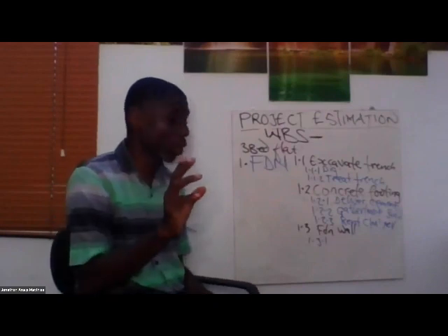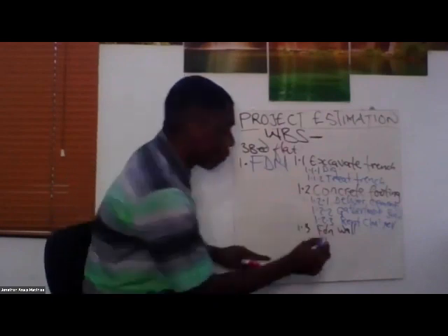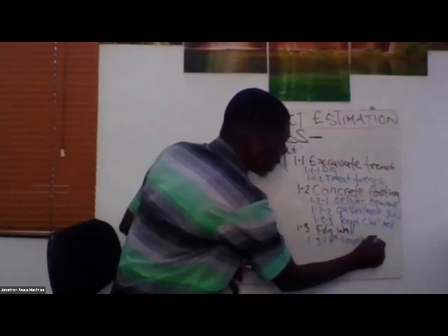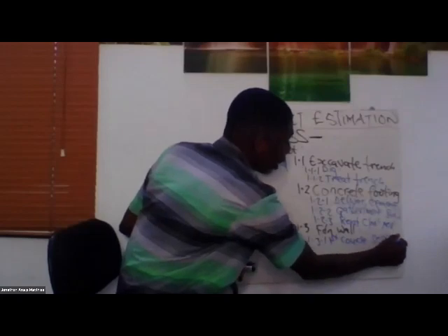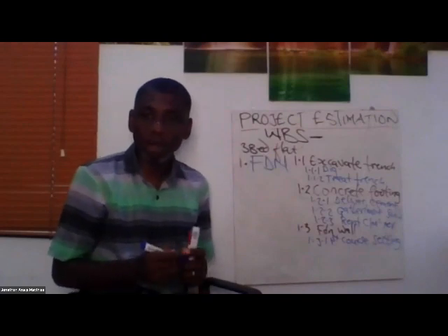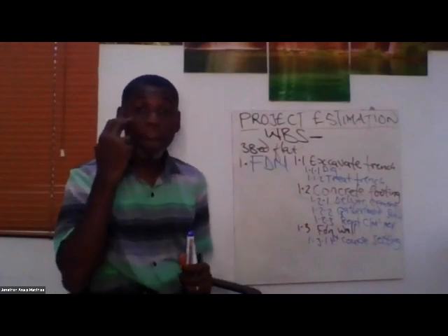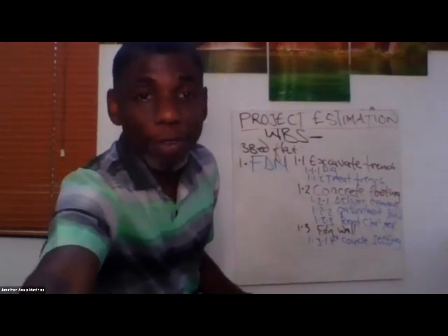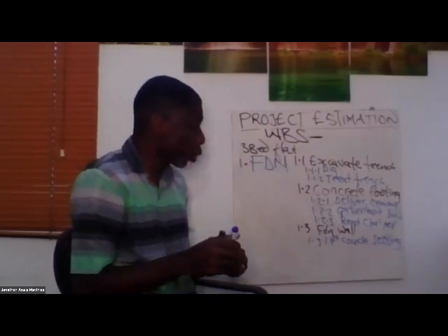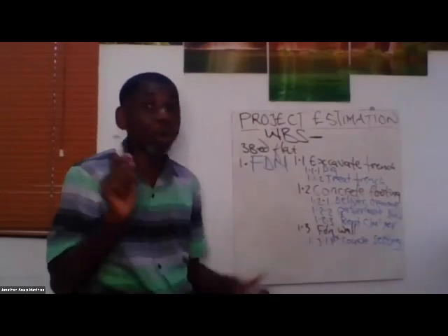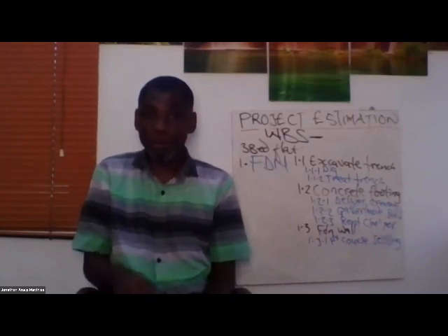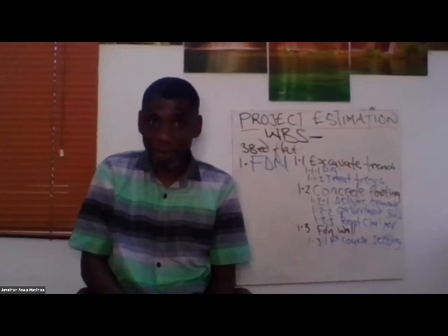And how do you give special attention to it? You can just decide that, okay, let me say first course setting. First course setting, right? Because if you don't get this particular setting right, the second course and the third course of block may not go well. So you may want to estimate it specially. And most masons charge specially when they are laying the first course of foundation. They will charge specially for it because it takes a lot.